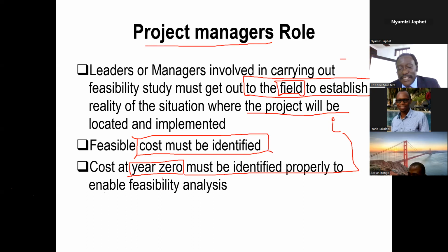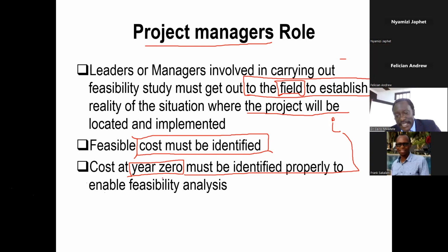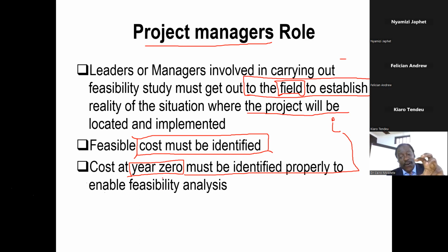These are some of the questions that you will always have. So if you introduce elements of sustainability, where you will start generating income, then you'll speak of a feasibility study. But if it is 100% donor funded, no, you go straight to the so-called needs assessment. This is similar to the government. If the government is 100% financing, you go for needs assessment. So you assess the need, and whether there are profits or losses, you will still invest.